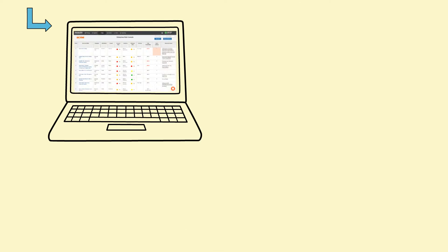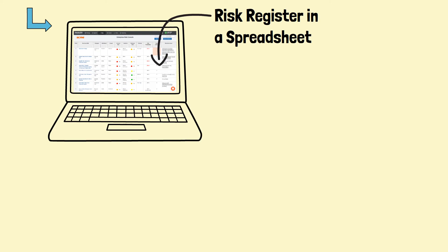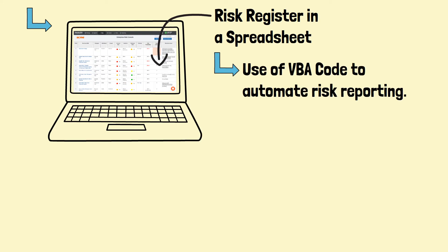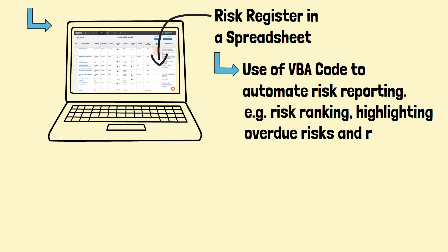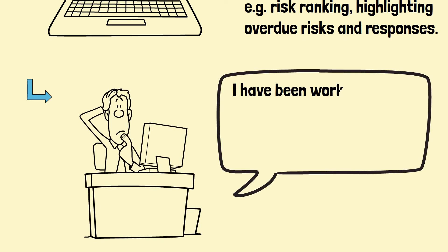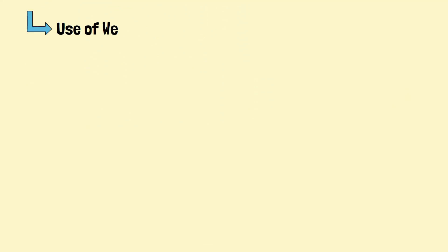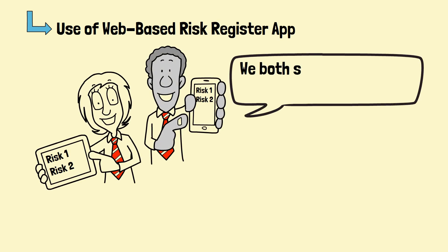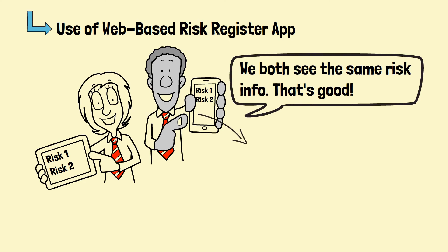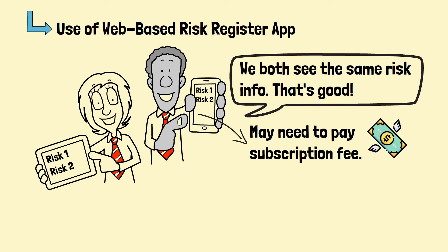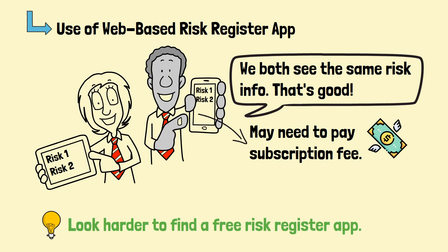The structure of the risk information can be easily captured in a spreadsheet. If Microsoft Excel is used, we could write some VBA code to automate certain functions, like plotting of top risks on a matrix and highlighting overdue risks and responses. However, a shortcoming of spreadsheets is that it's not easy to control the version if the risk register is to be used by more than one person. Web-based risk registers may become handy, as all users will always see the up-to-date risk information. However, many risk apps may need subscription fees to use the functions. If you look harder, you may be able to find a free risk register app.